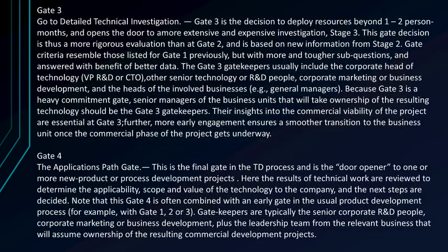Stage 2. Technical assessment. The purpose of Stage 2 is to demonstrate the technical or laboratory feasibility of the idea under ideal conditions. This stage entails initial or preliminary experimental work, which should not take more than 1 to 2 person-months, and last no longer than 3 to 4 months. Activities here typically include undertaking a thorough conceptual technological analysis, executing feasibility experiments, developing a partnership network, identifying resource needs and solutions to resource gaps, and assessing the potential impact of the technology on the company.